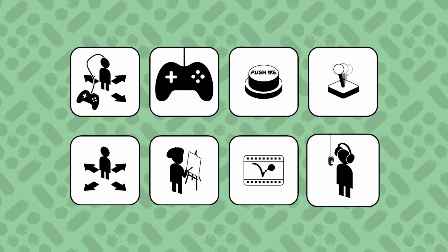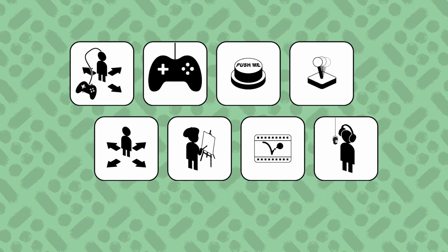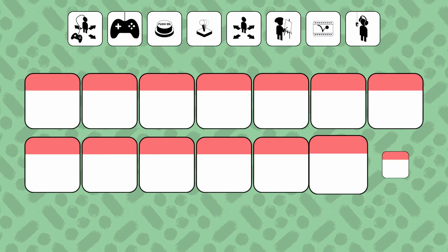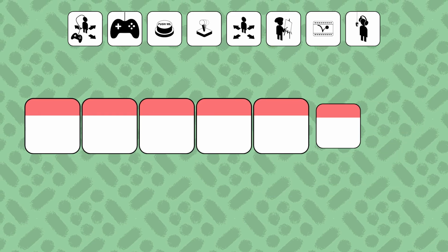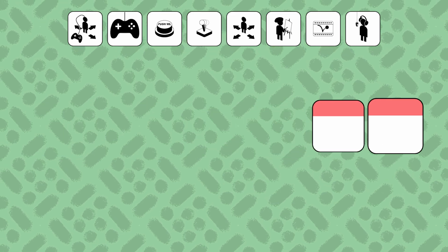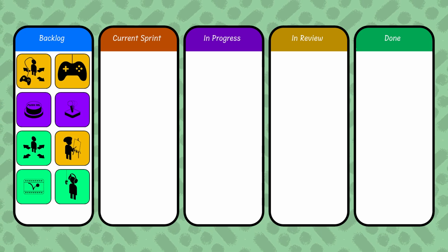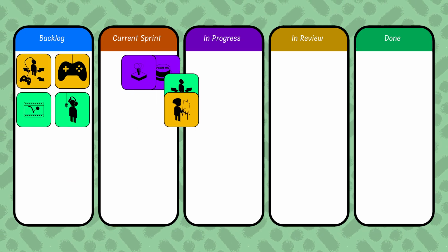Developers will complete as many of these tasks as they can over the course of a development cycle, or sprint, which is usually 2 weeks, but can be whatever length of time works best for you. When working as part of a team, each sprint might start with dividing up tasks amongst the group so everyone knows what everyone else is working on.